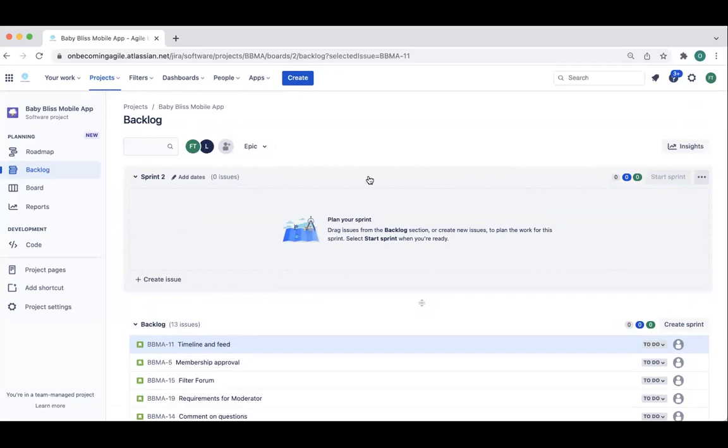Now I just showed you how to complete a sprint. When you're done completing the sprint, obviously it happens maybe before demo day or after demo. Your team would have decided what they're going to demo. Remember, as a Scrum Master, you come up with the agenda: what are the things your team will demo? It's not everything you commit to that you will complete. Whichever ones you complete are what you want to demo. SAFe says you can even demo incomplete stories, but most times it's what you completed that you want to demo.